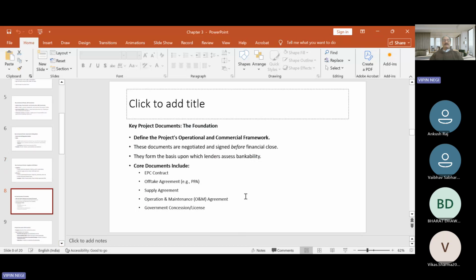The concession agreements deliver the project site to the private developer. Normally in the concession agreements, the government public body agrees to meet the rehabilitation and resettlement expenses if there are any. Then the concession agreement also specifies the term of the agreement, such as 12 years in the case of 6-lane projects in the road sector, and also the termination rights in case of end of the concession period or force majeure.